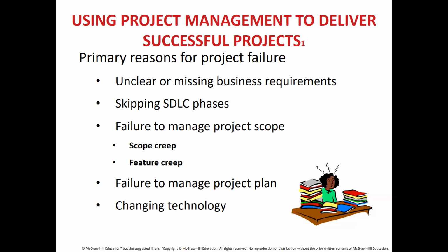Okay, if you have a very large project, for example, implementing a very large ERP, enterprise resource planning software, in an organization, it may take you a couple of years. A very good example is FNE just went through an ERP change, took them 4 years to get the entire thing done. Now, if during that phase, let's say the ERP becomes obsolete, what happens? Project fails because technology has completely changed.